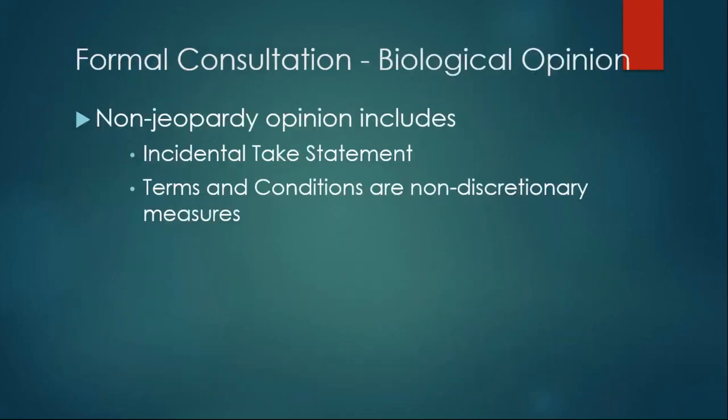The result of formal consultation can be a biological opinion, which is a non-jeopardy opinion, including an incidental take statement and terms and conditions that are non-discretionary measures, meaning we have to fulfill those items that the service is requiring.